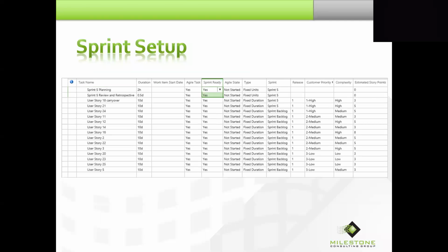So that's why we do an ungroup. We set up the duration at maybe 2 hours for the planning, half day for the review and retrospective. And you could add any number of tasks you want. You certainly wouldn't add one for the daily stand-up because that's just too short.